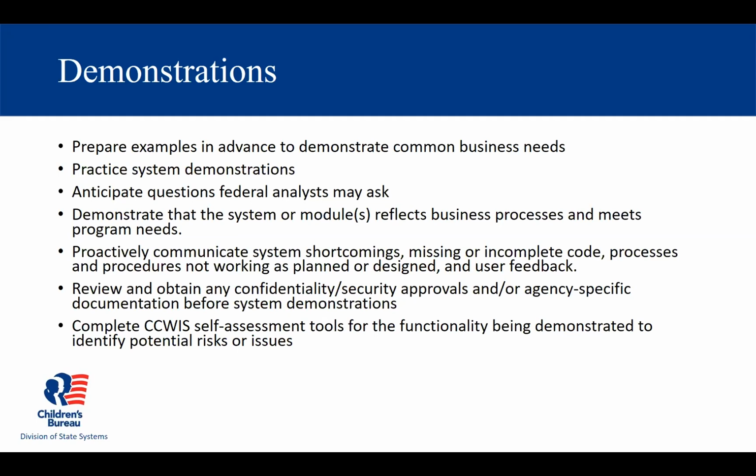In many cases, project staff have outlined the criteria they use for prioritizing issues and provided a very solid rationale for why they're not addressing the issue we brought up now. It may be that it affects very few people, or there's a larger initiative such as AFCARS 2020 that needs to be dealt with first.